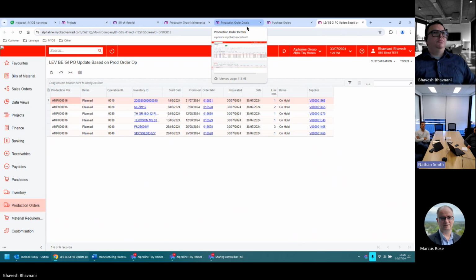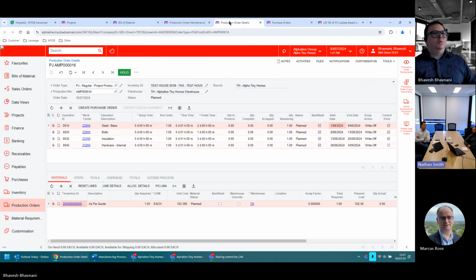Now, do we set that up in advance when we create the BOM, or how does that work? There's a start date on the BOM. And there's a move transaction that happens when it moves zones, work centers. So when it moves from fabrication to framing, there's a move transaction that tells it the start date that the transaction has occurred. There's a planned date and then a realignment of the base at each move.